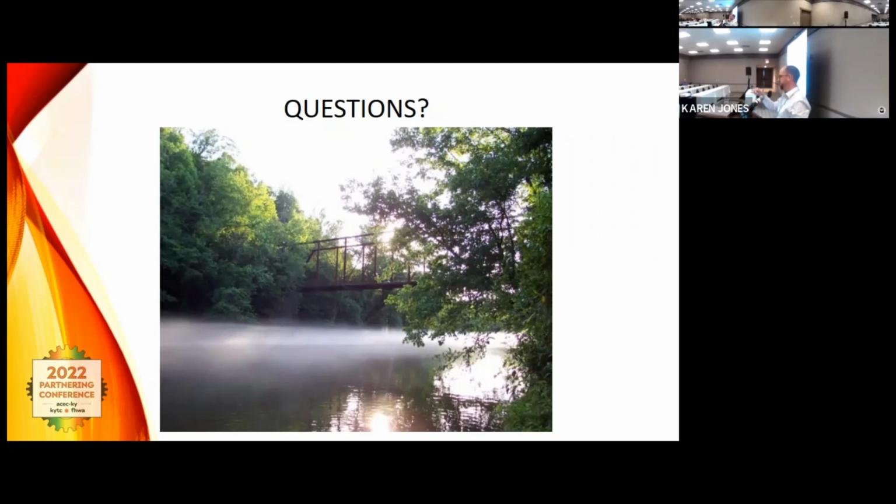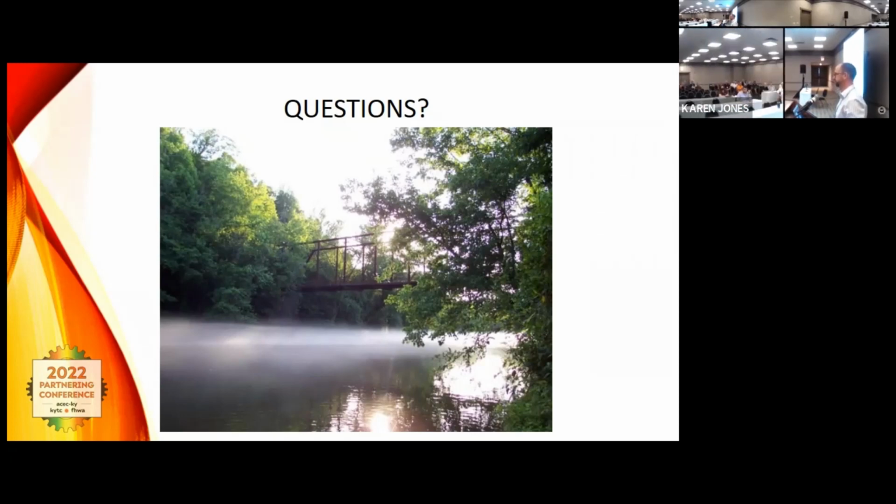If it was in one permit together and that permit outlined one amount of mitigation, generally the Army Corps wants to see that mitigation paid up front, even when you're only letting a section. I've already told the project manager that's probably what's going to happen. You told them correct. Okay. Yeah. Good question, though. We get that occasionally.